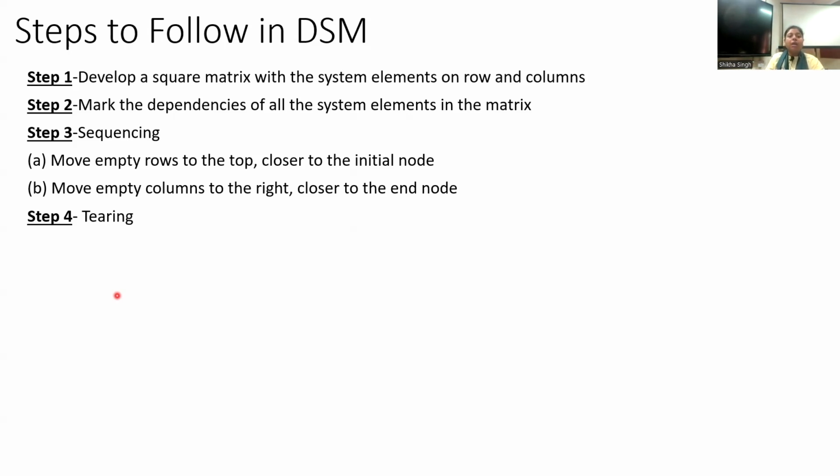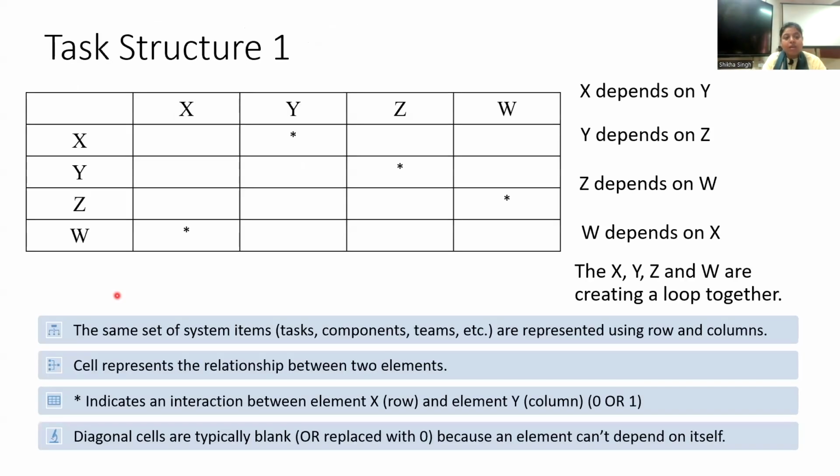Pairing is something you saw in the previous example. These are called the pairs. Pairs in the sense, again, blocking the diagonals, one, two, three, and then lastly the fourth pair. So now you see these are called the tears. This is a tear. This is called the tear marks, and we try to avoid them. Why? Why would we like to avoid the tears? So removing these tears is called tearing.